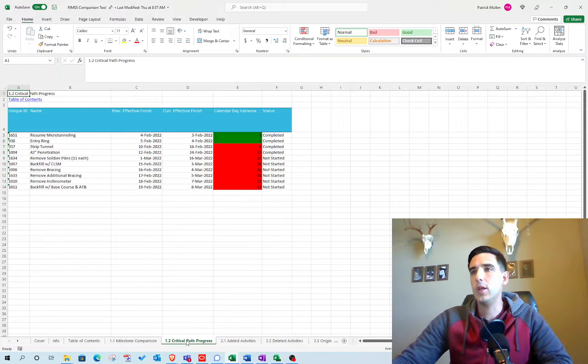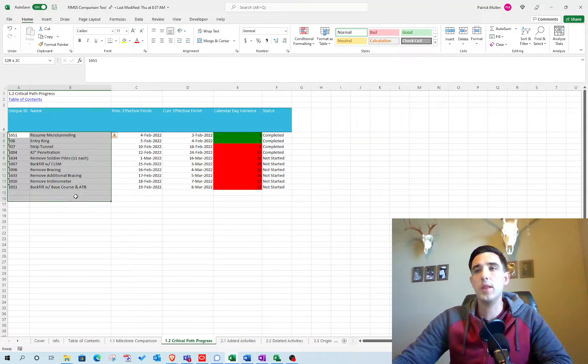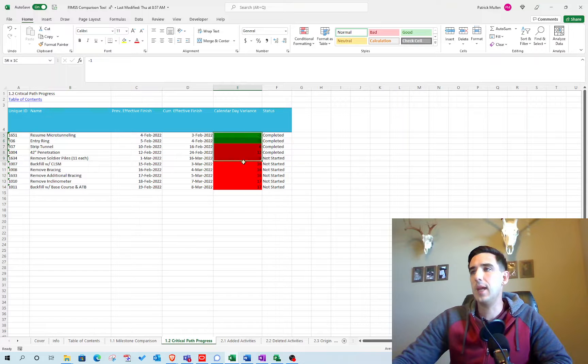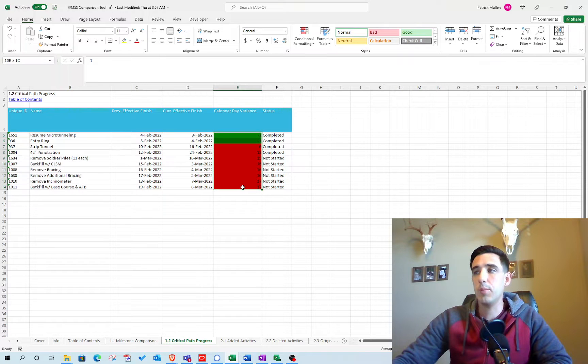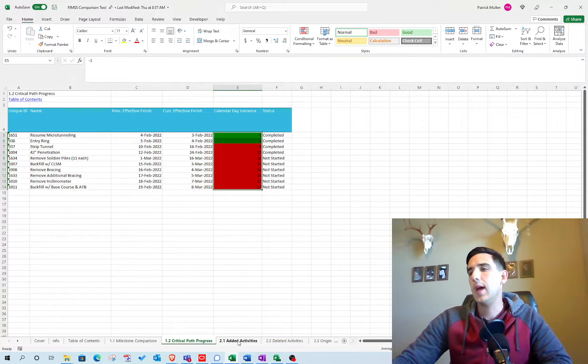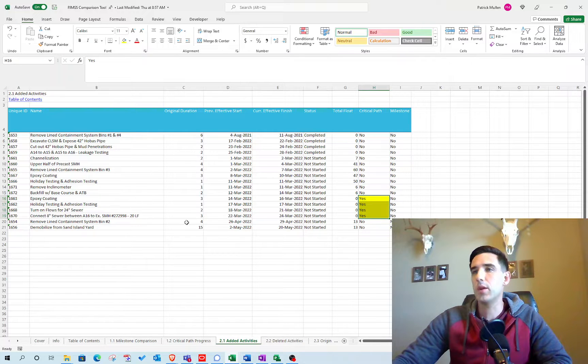Critical path progress shows the items that were on the critical path in the previous update and whether they maintained their progress or slipped or gained. Added activities highlights the items that are on the critical path that were added.